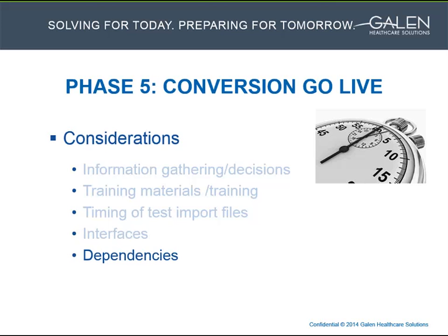Another example would be identifying whether tasks, such as med renewal tasks that might be coming in electronically even, need to be worked prior to conversion. If there are reminders in the legacy system that the providers would like to have access to, do those need to be rebuilt in the target because they're not going to be included in the conversion, for example? Those are just a couple more examples from my experience that should be discussed and understood.